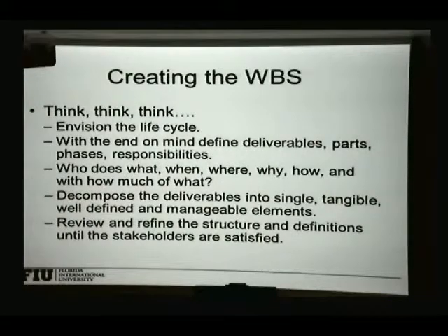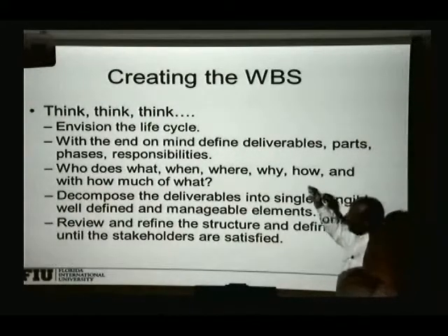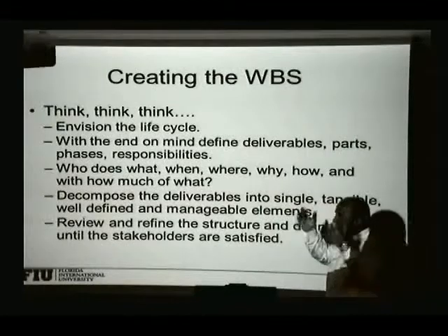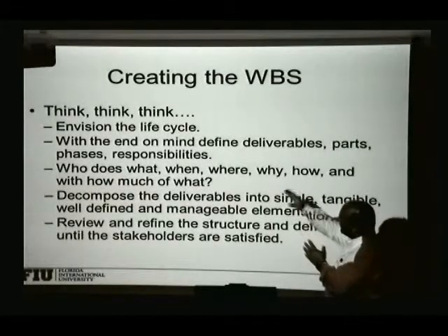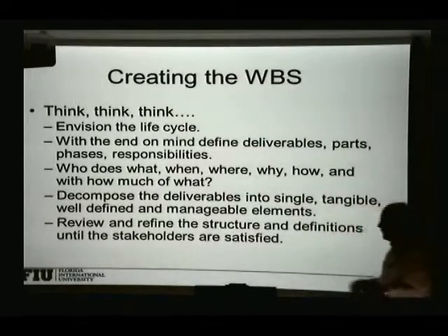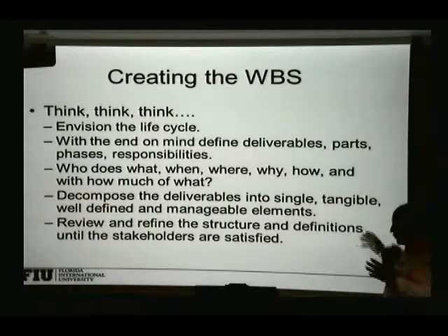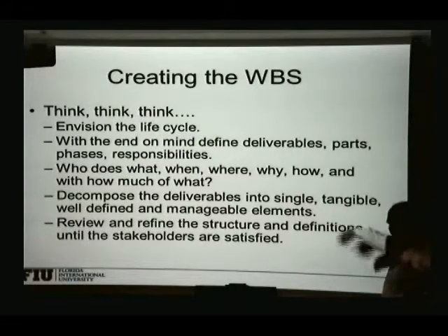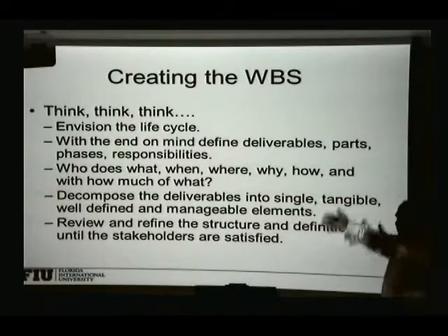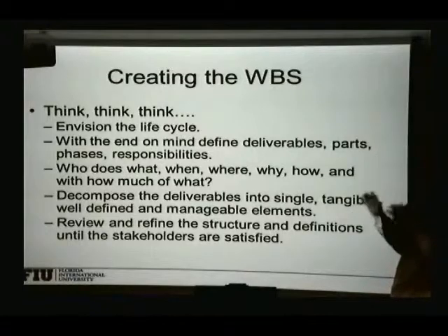So what you need to do is think a lot about what the project looks like, how to go from the ground up, what the different elements are in the life cycle, who is going to do what, when, where, why, how, and for how much. You're going to describe the process of cleaning the area, putting up a fence, bringing in temporary utilities, excavating for your footings, putting in the footings, putting in the slab on grade, going up with the structure, closing it up, and doing the interior parts.